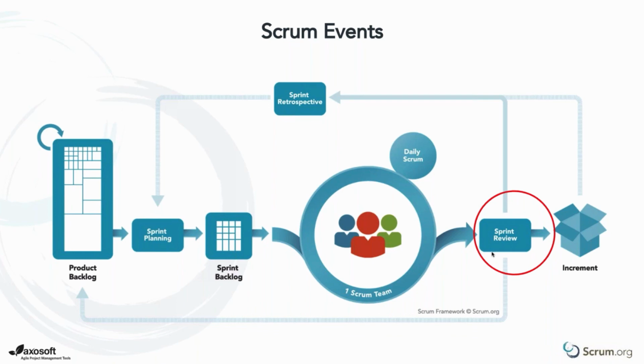The sprint review allows all stakeholders, or those who are available, to come and review that. It's not a demo. It's a conversation which will include seeing the delivery, the product. So you can see how the word demo sometimes fits in there, but it's an opportunity to inspect that increment, make sure we're delivering what we thought we were going to deliver, make sure our stakeholders see what we're delivering and provide us feedback. And this happens before planning so that we can plan our next sprint based on that feedback as well. We may change some of our priorities based on that.